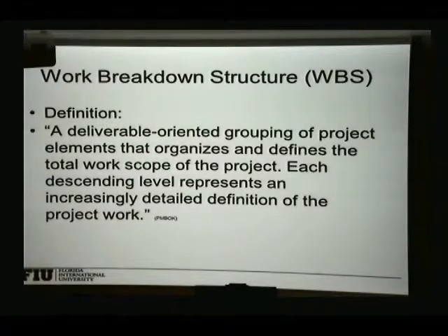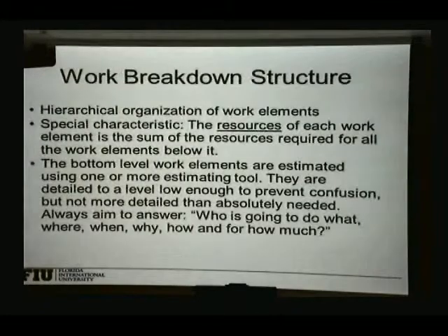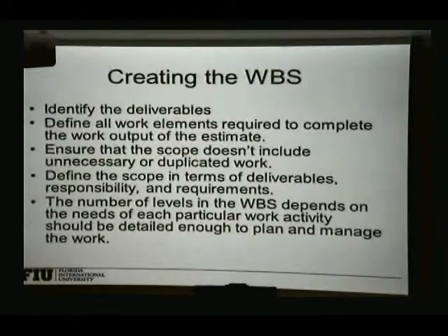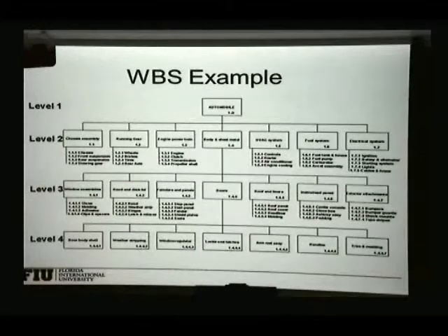All right, so the work breakdown structure that we talked about before is a way to break down your entire project into smaller chunks, so you can study them and estimate them. By definition, it's a deliverable-oriented group of project elements that are organized in such a way that defines the scope of the work. So it's a hierarchy system.